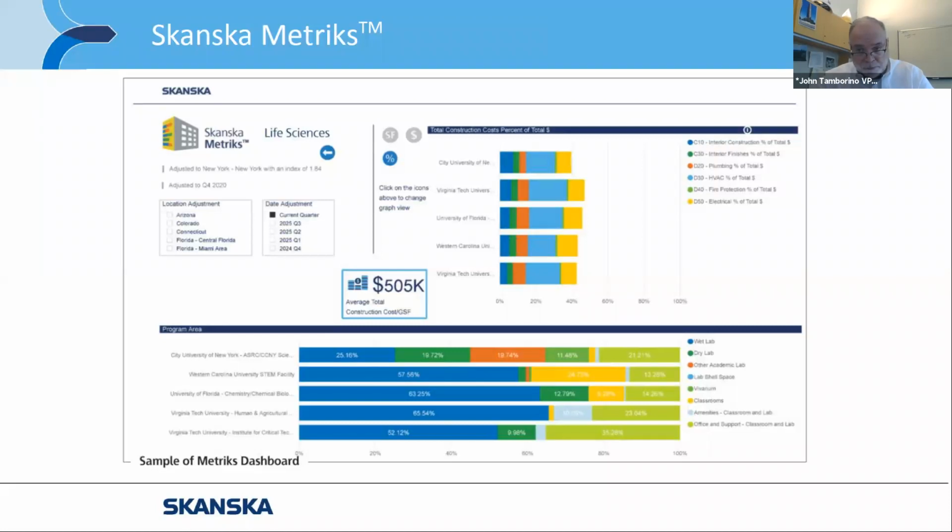This is only a first quarter report. Our second quarter report comes out in July. Plywood, as many might be aware, is up by 12.8% from last quarter to now. So all these things have to be factored into any cost that we give to any client. It's important to stay ahead of these things, and we try to keep abreast by publishing these market trends reports. And I'll give it back to Nancy.